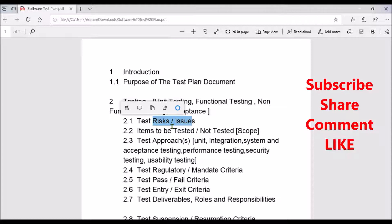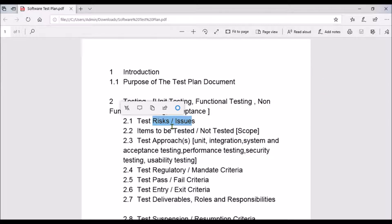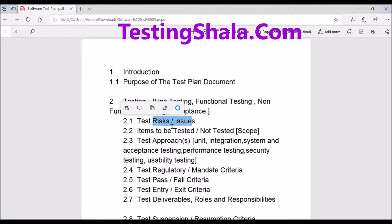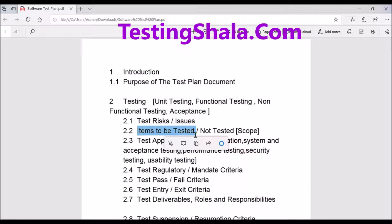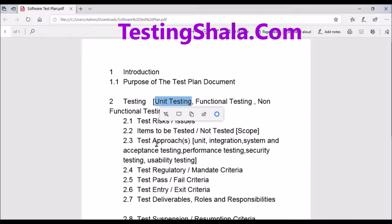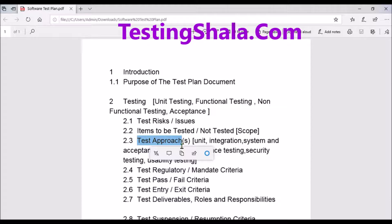You have to put a table calling out the risk name, risk details, who is responsible for mitigating or resolving the issue, and when the issue will get resolved. Everything should be in a detailed table format to give a clear visualization to stakeholders. You will also be defining what features you will be testing and what features you won't be testing as part of unit testing, the test approach, tools you will be using, and everything will be documented.